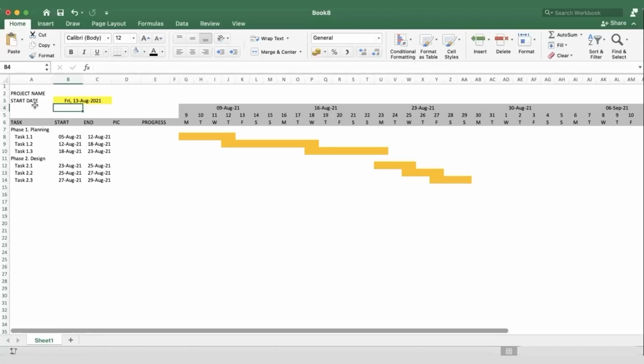Now let's enter the display week. That corresponds to this cell here. We'd like to fill it with yellow, and we'd like to name it, so go to the name box and name it display week. What we would like to do is for the timeline to change based on the entry in the display week cell. So if this is a 0, this will show the week before the start date. And if it's a 1, it is the week where the start date belongs. And if it's a 2, it's the week after the start date.